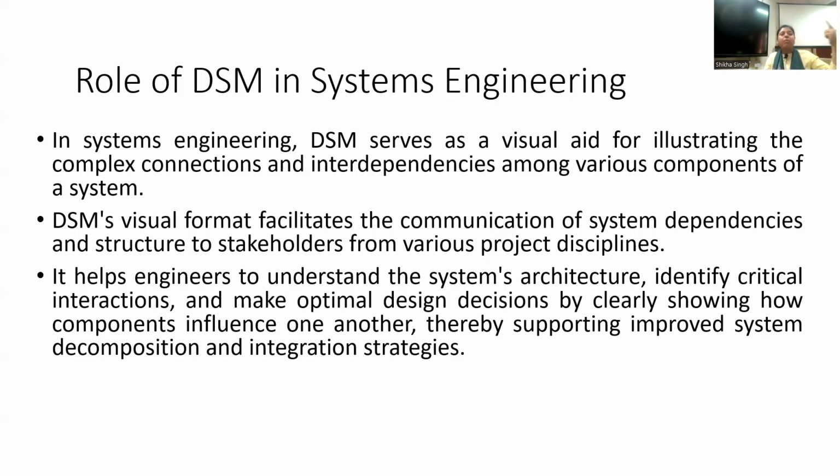And after that input, what will happen? You've already performed X3, right? So the input coming from X2 now after 1 week, what will it call? It may need rework on X3 because X2 you have completed just now after 1 week, right? So this is how the information dependency is very important to notify while defining the work. So what do we try? We try to minimize the rework basically. So the main agenda of design structure matrix is to create the clusters to break the feedback loops.